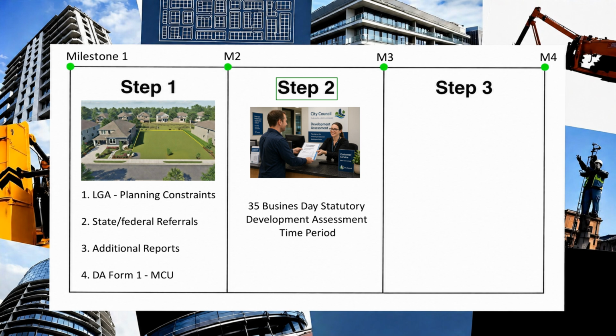To put that into perspective, if you submit an application and don't have an approval within 2 months, the applicant is usually not providing adequate information. Unfortunately, many people leave out the important information which triggers information requests and back and forth dialogue to resolve any issues, which causes major project delays. It is more efficient and productive to complete step 1 correctly, obtain your approvals, and just get on with your development. Which brings us to milestone 3.